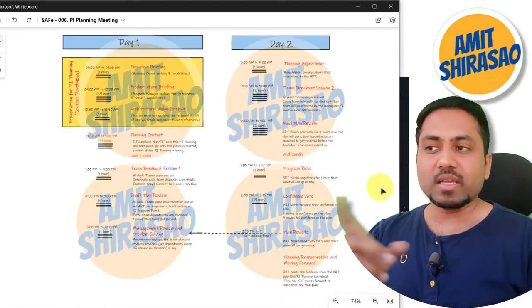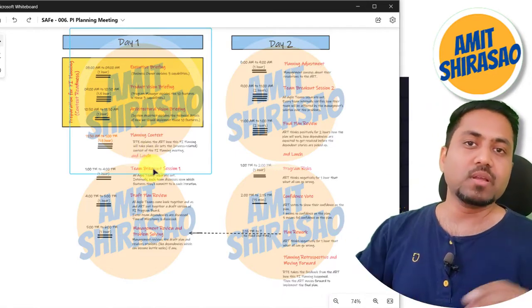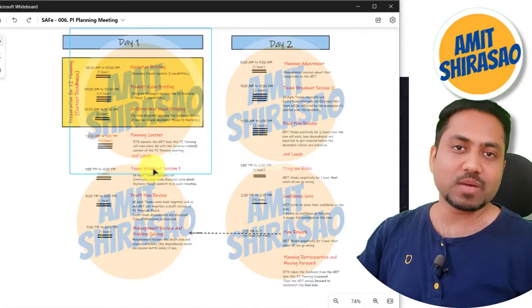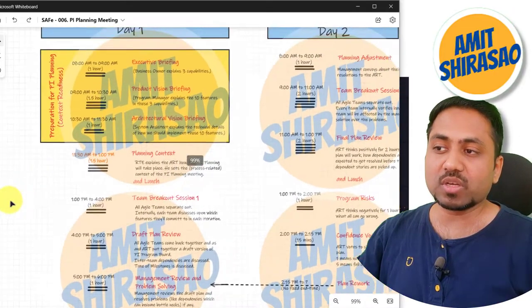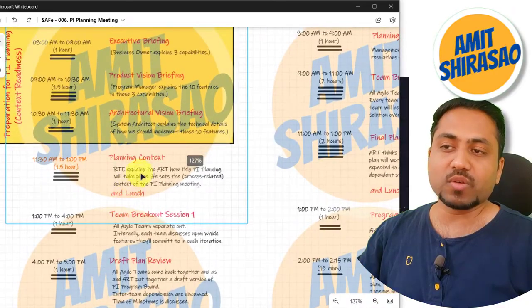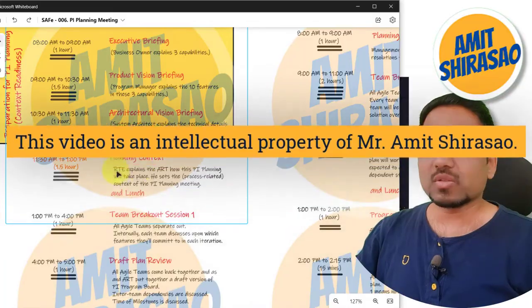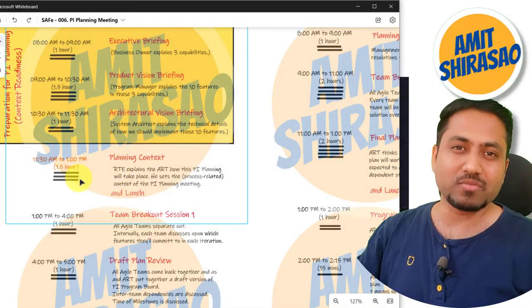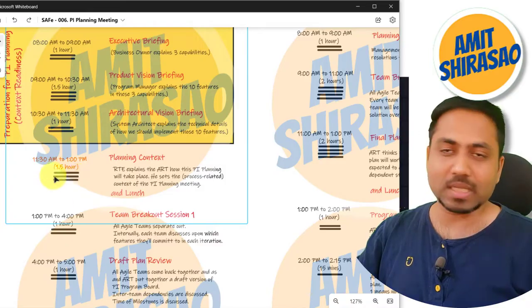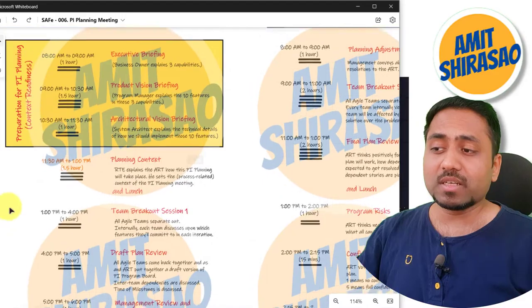RTE will first explain to these 50 to 125 people how this PI planning meeting is going to be conducted. He or she is just going to explain what we are going to do for the rest of this day and for the next day. That is called the planning context. It takes around 45 minutes, and then 45 minutes are left for your lunch. So total 1.5 hours.